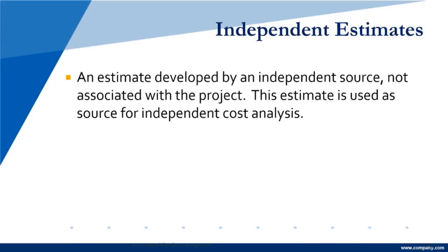Independent estimates is when you get an independent source not associated with the project, and it is a way of getting independent cost analysis. That's really what you're trying to do. You don't want to spend too much. You want to know what it costs to procure something that you have defined.